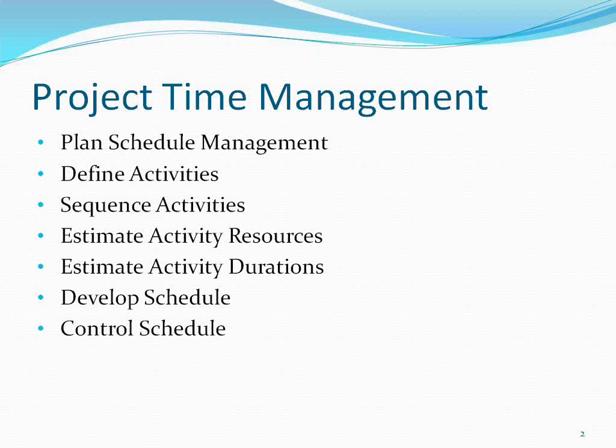Then you will estimate activity resources for each activity. In the sense, to do an activity, what resources are required? Remember, it's not only the human resources. The type of resources can be material, equipment, supplies. Anything is a resource, including human resources.